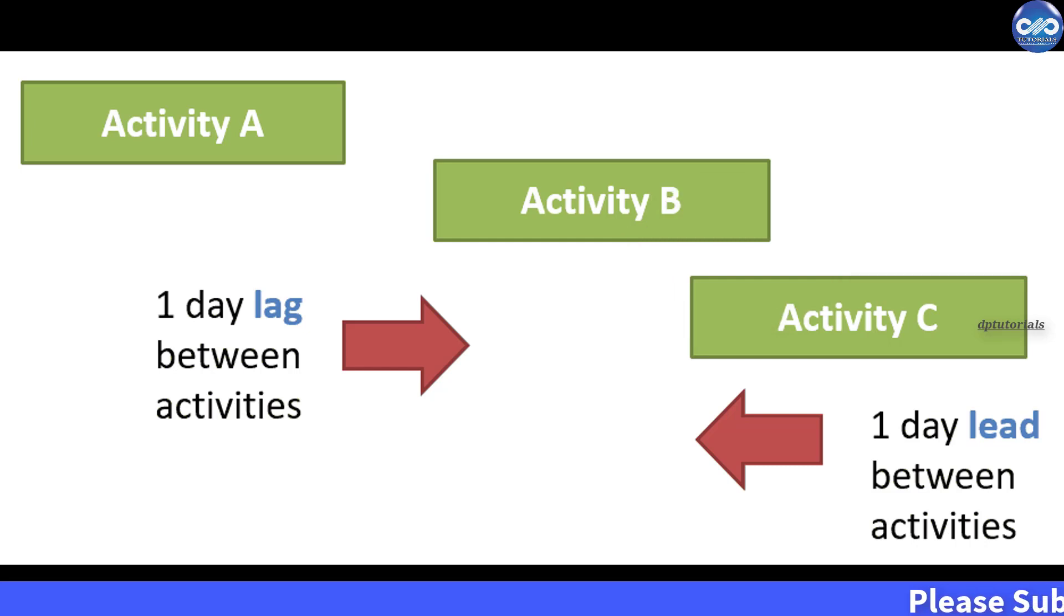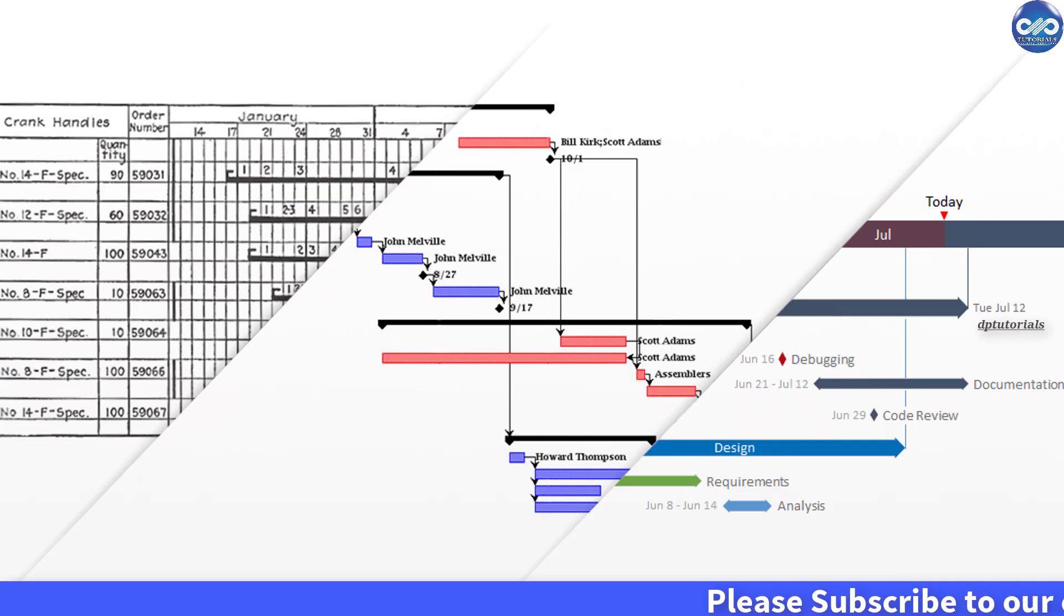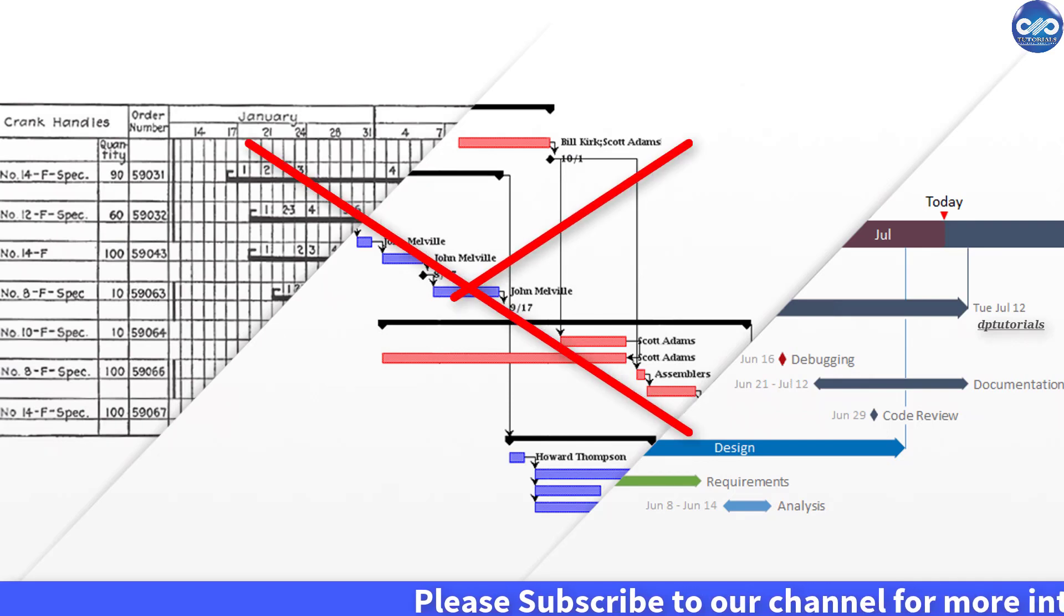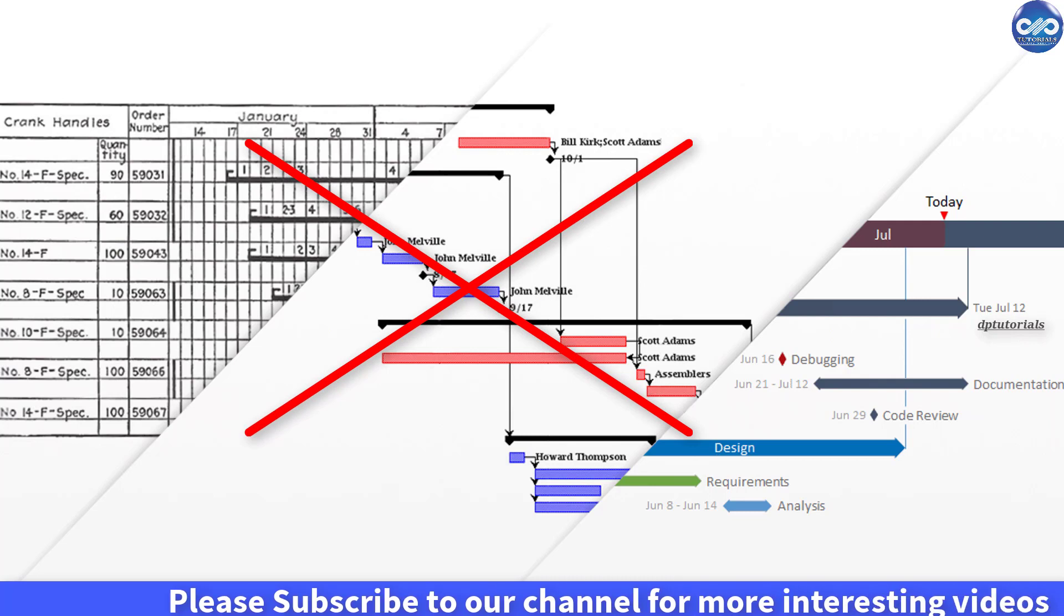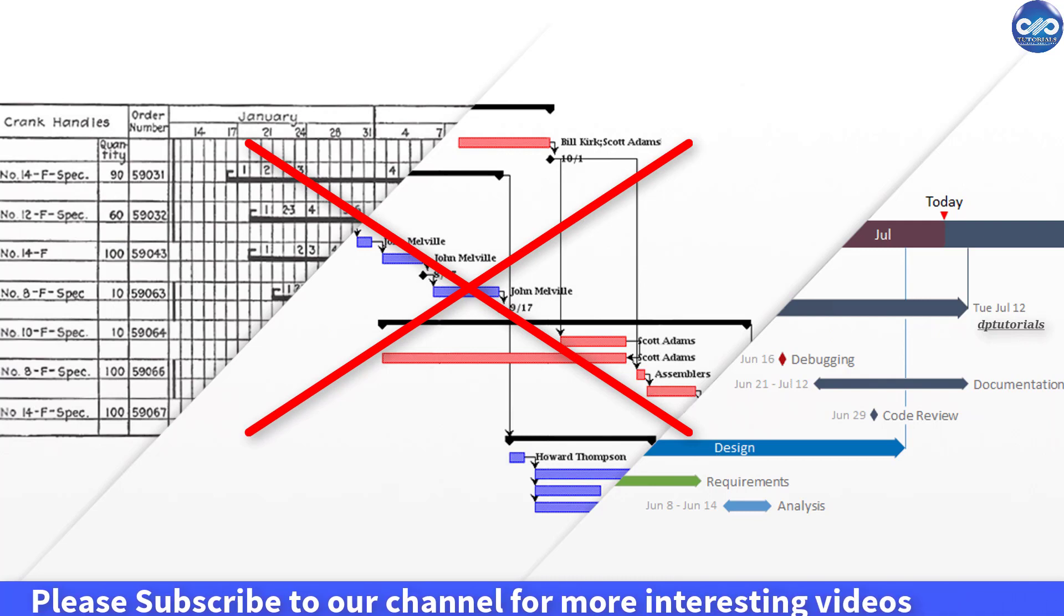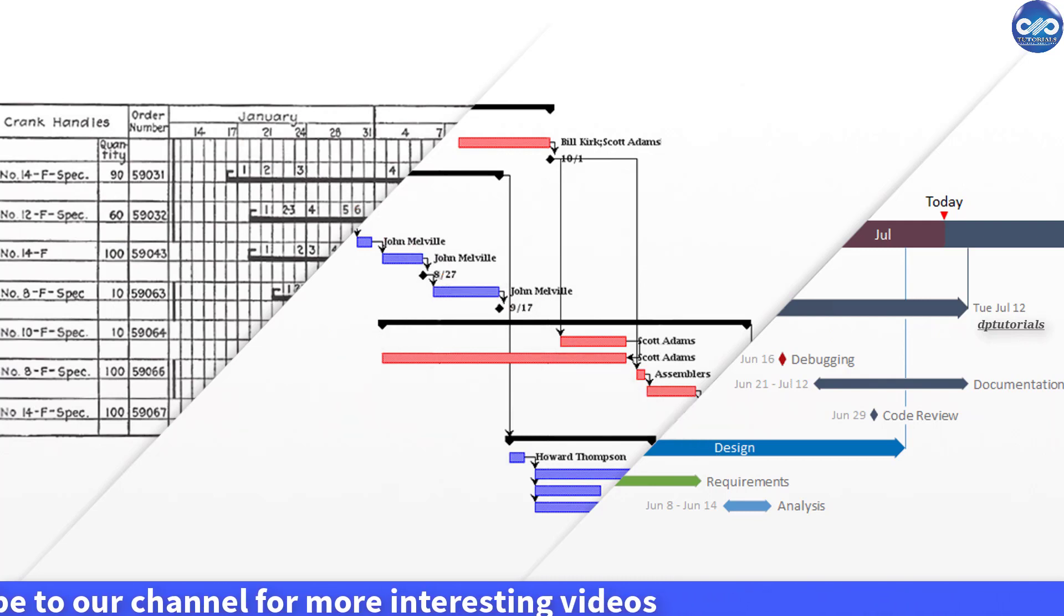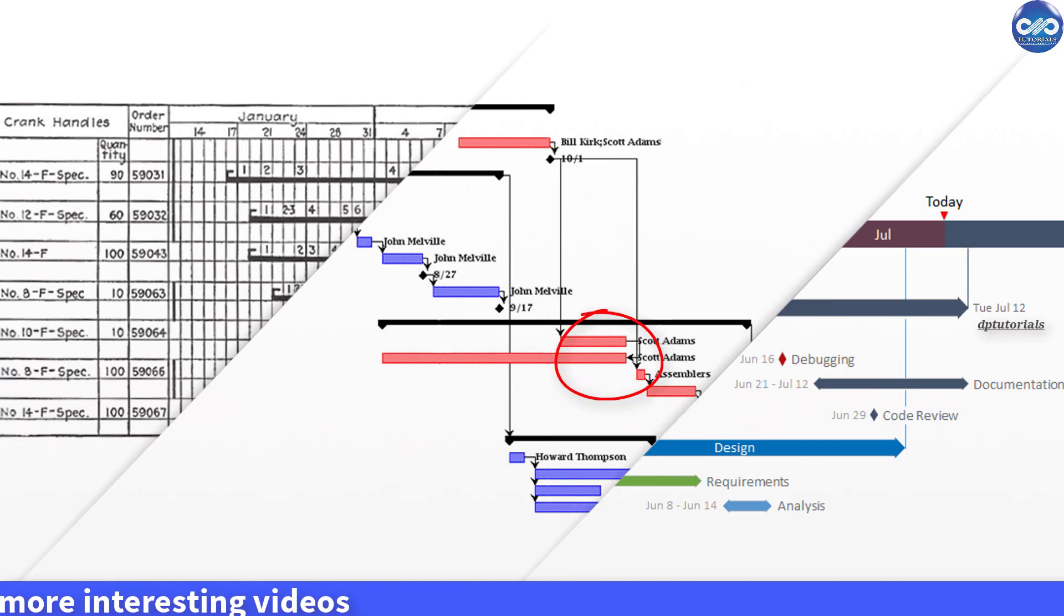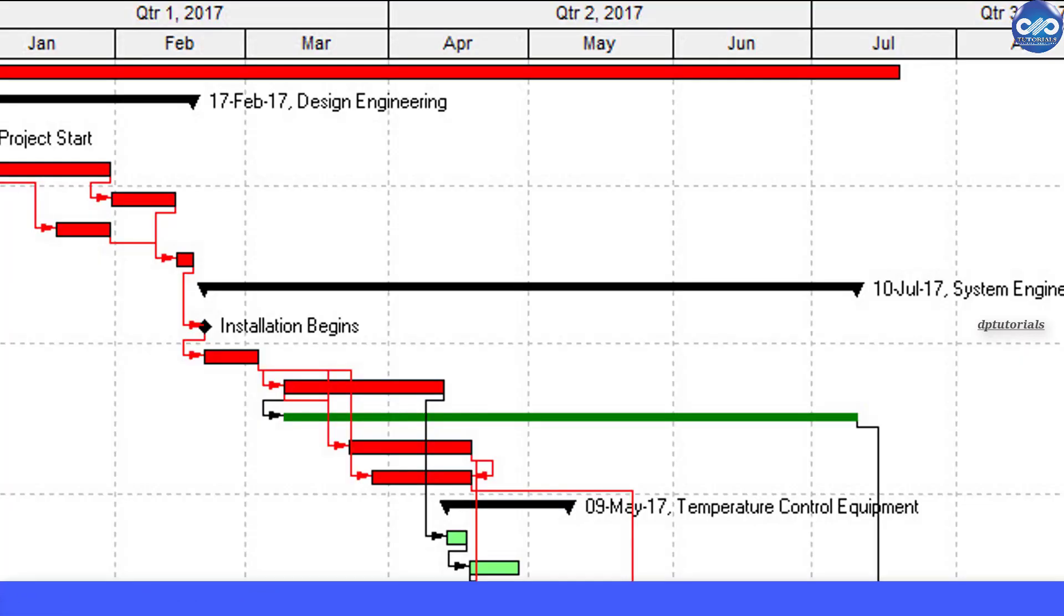Friends, according to scheduling standards, using lags in a schedule is a big risk because no one will ever understand the exact reason behind the logic of lags except the scheduler who has prepared it, or sometimes even the scheduler might be forgetting the exact reason.